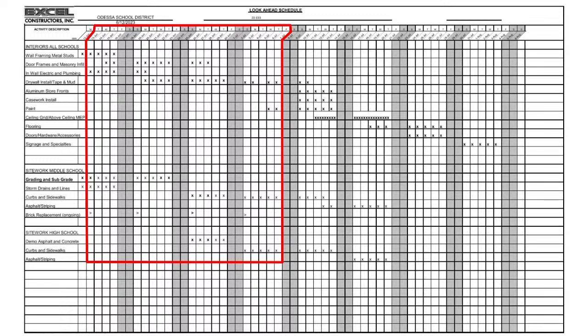Starting later this week through the next couple weeks is going to be installing door frames inside those metal framed walls. And anywhere there's a block wall that we put an opening, there's a little more work that goes into that to detail those out and put the frames in. So that's going to happen over the next couple weeks.